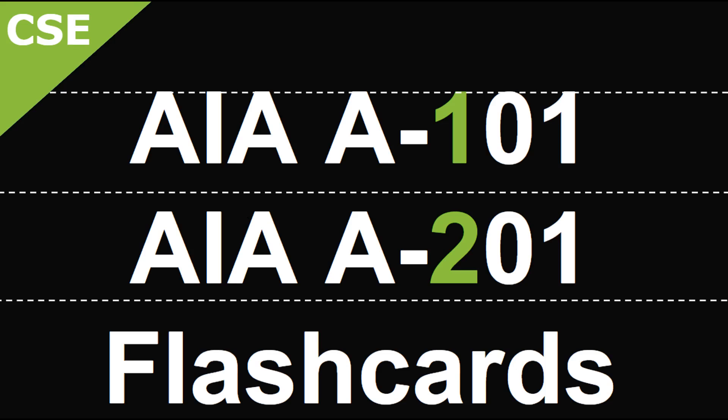AIA 101 and AIA 201 flashcards. What's the standard form of agreement between the owner and contractor where the basis of the payment is a stipulated sum? A101 is the standard form of agreement between owner and contractor where basis of payment is a stipulated sum.